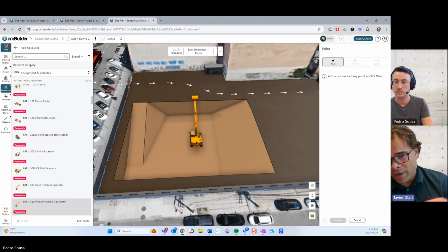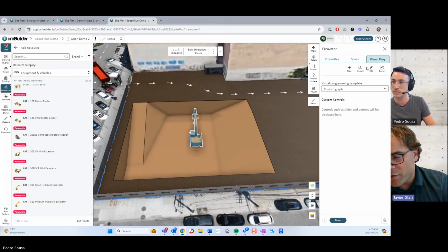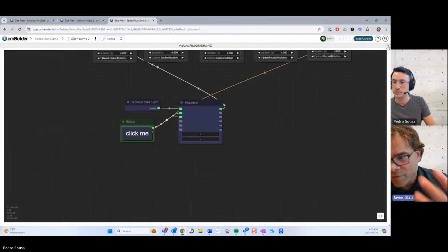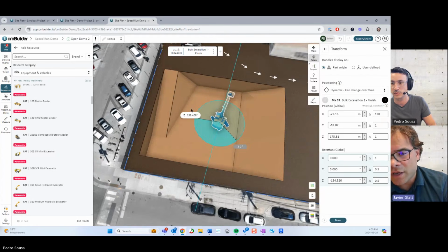It's a great way to do a quick takeoff of the earthwork with the swell factor incorporated, analyze how many trucks you're going to have, all that kind of good stuff, and make an informed decision with the client.